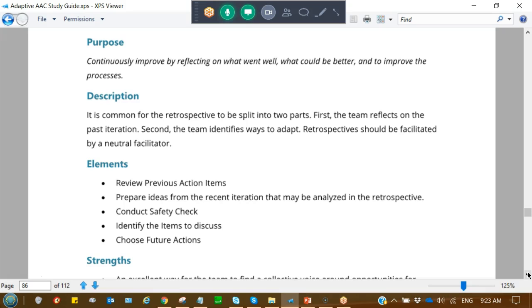We had a problem with that early on when we were doing this at the Royal. While retrospectives are supposed to be an opportunity to talk about processes as well as the iteration, we made sure that we had those broken out during the retrospective, so that we didn't just get stuck. Mm-hmm. So I think it's important to try to have an agenda for them. Don't just go in ad hoc, because if you do, you're just going to open it up to a crap session.